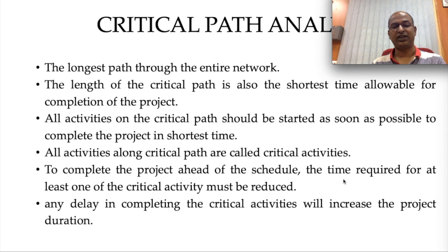All activities along that critical path are known as critical activities, and any delay in completing a critical activity will increase the project duration. And if we want to complete the project ahead of the schedule, the time required for at least one of the critical activities must be reduced.